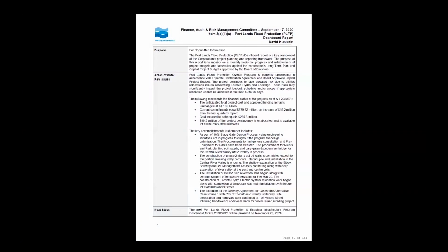With the exception of one of the utility issues, we are forecasting the project to be complete at or within the approved budget and schedule. And in fact, we are forecasting a 72% probability of completing under budget, which is essentially the same percentage as we were forecasting at the 60 and 30% stage gates based on the EAC.